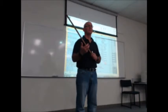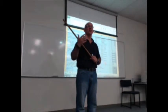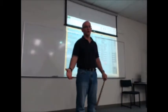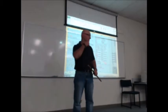I mean, I've downloaded a few off the internet, but they're a bit all over the place. Yeah, you will find that. It all depends on the shape and size of the roof. The more valleys in there, the more cost, the more work. All right? The valleys are the ones that bump the price up.